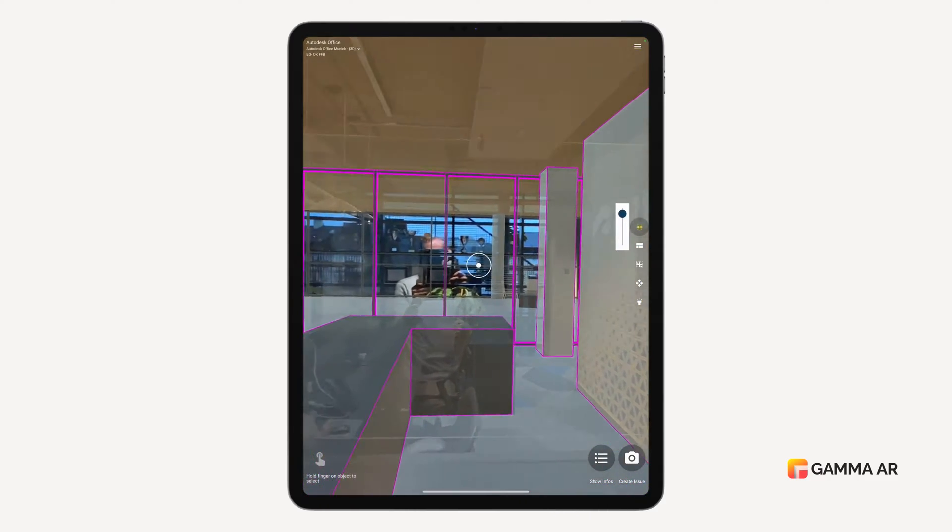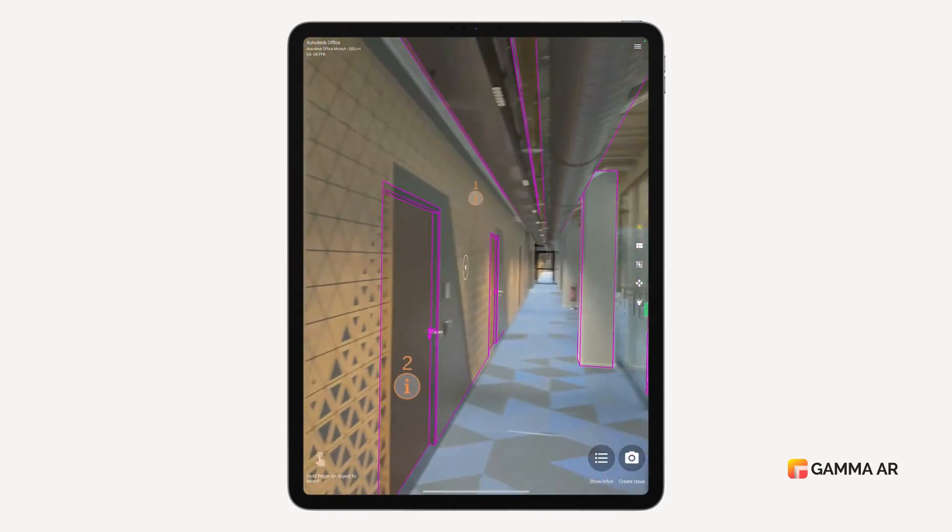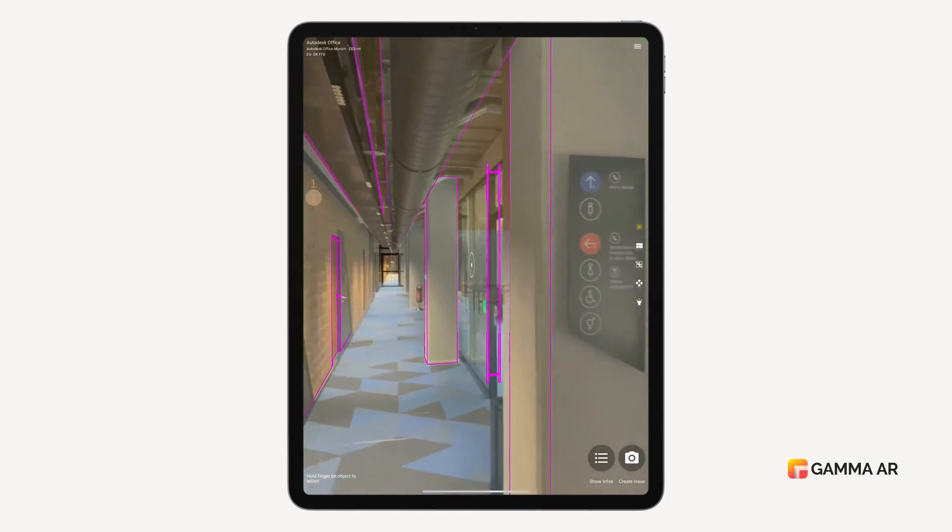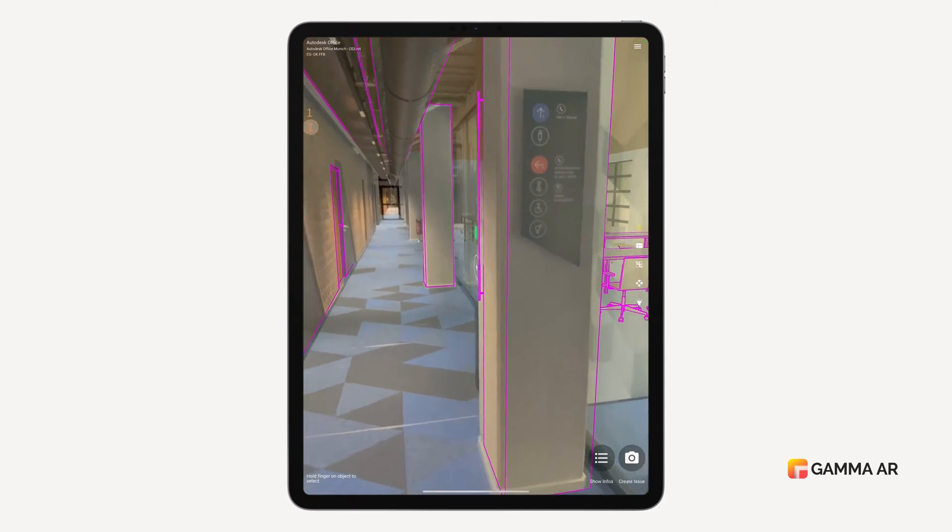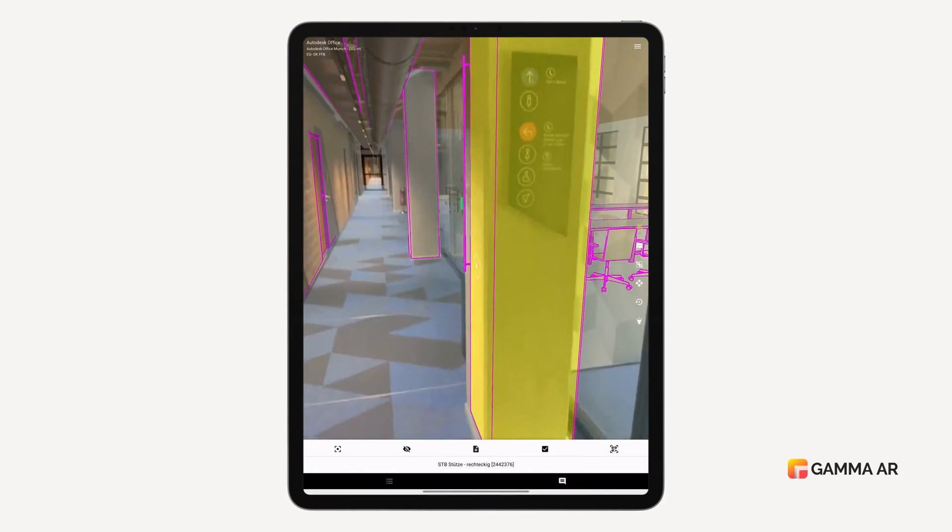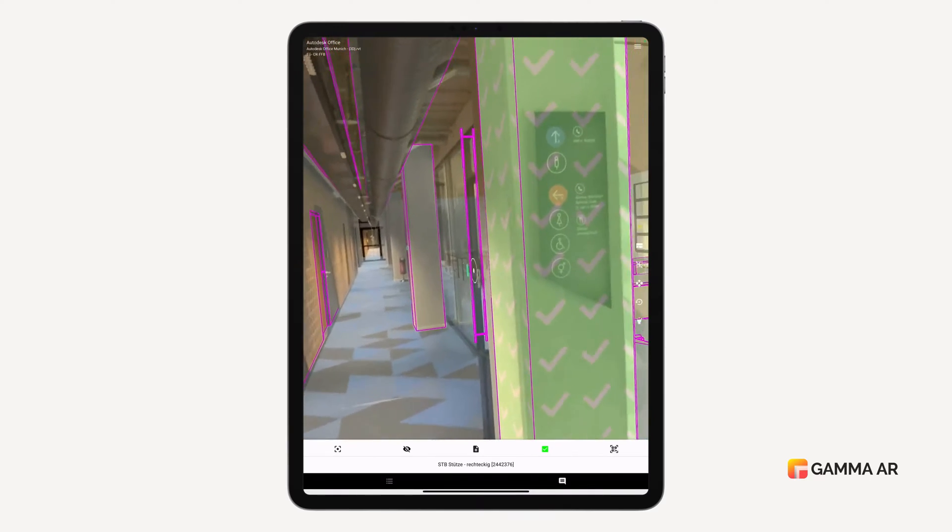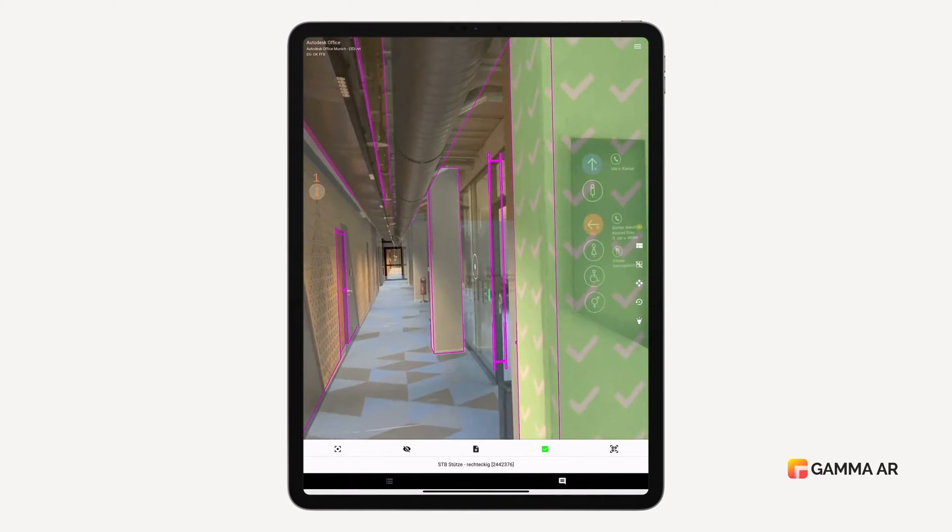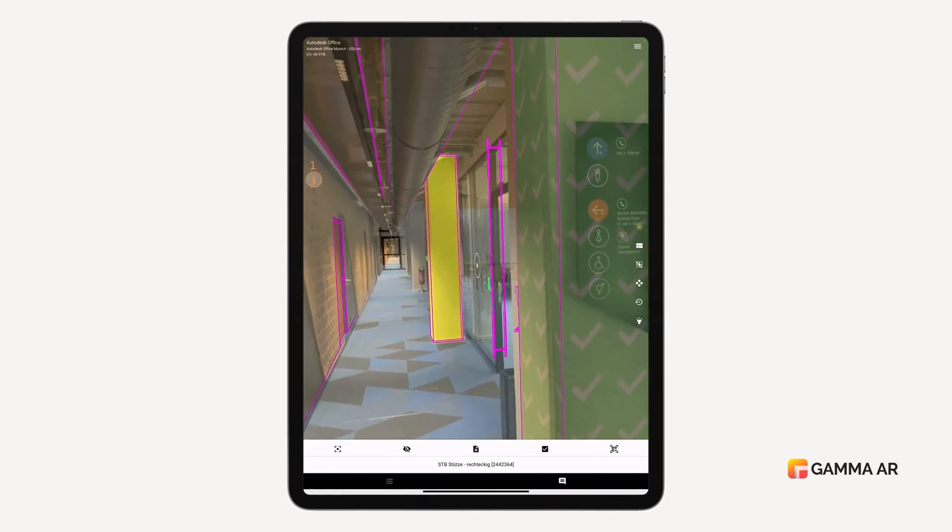Gamma AR allows superintendents to track progress by overlaying 3D BIM models over the construction site. In this example from the Autodesk Office, we are marking multiple building components like these columns as completed.